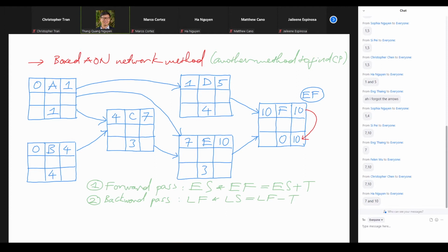And the bride-to-be and the groom-to-be don't want to delay that wedding day at all, right? They don't want to wait for another week. They have to plan to fly somewhere for their honeymoon, so they want to keep the deadline strict at the end of the 10th week. So we impose a condition that we don't want to delay the project at all. The earliest finish date should equal the latest finish date. So that's the logic why we have these two values equal, right?